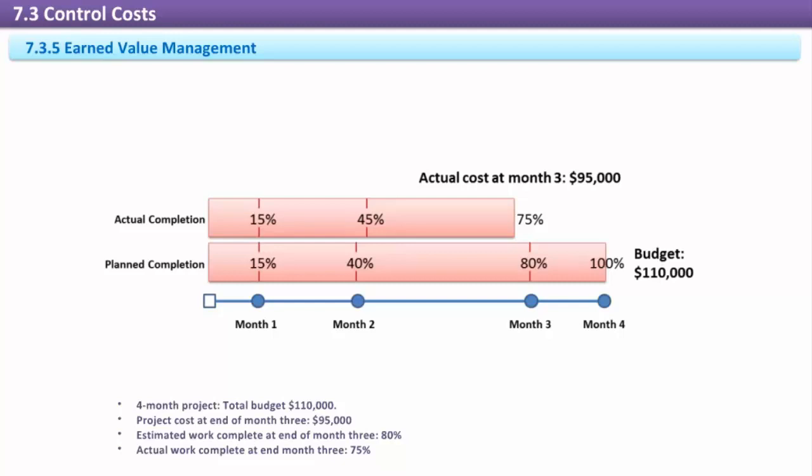So we have to find out the causes of those variances, even if the variance is beneficial. No project performs perfectly as planned, so EVM values that are regularly reported as perfect are probably an indication that something is awry with the calculations or underlying data.